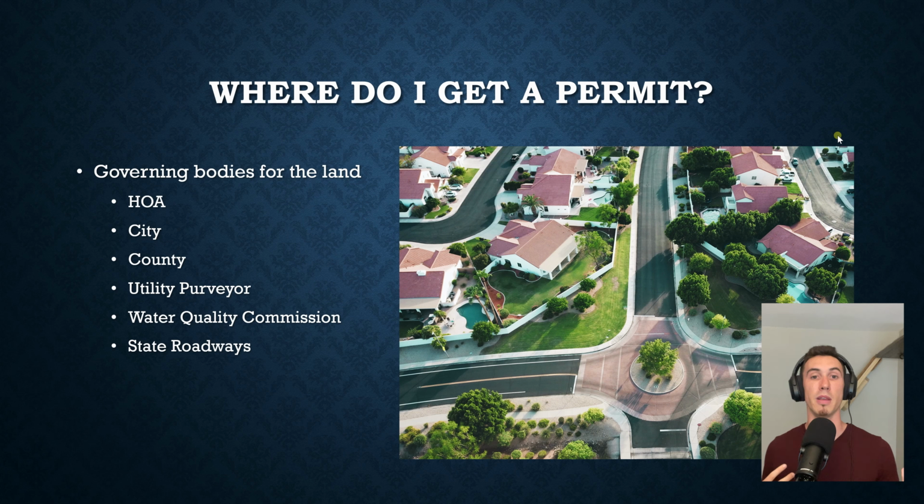And of course, if you happen to be over a water aquifer or recharge area or something, and the people are very particular about controlling the construction waste and debris and stuff that gets in waterways, then you ought to be aware that you've got to get permits for that. And that gets kind of messy. But if you happen to be putting a driveway connecting to a highway out in the middle of Texas or somewhere, then you may end up getting a permit to connect that driveway so that it's built to the standards that the state would want you to build it to.